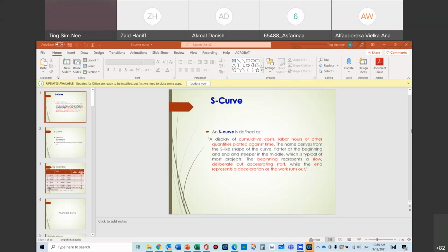For detailed estimates, you will have what I showed you, the work breakdown with the different categories of labor, machineries, and material first. Labor, you've got skilled, unskilled, semi-skilled, into different categories, and for each and every one of them you really have the quantity and the numbers to complete that particular job. Then you add the machineries. The machineries also have major, minor, plant, equipment, and then you really have the numbers and all that.